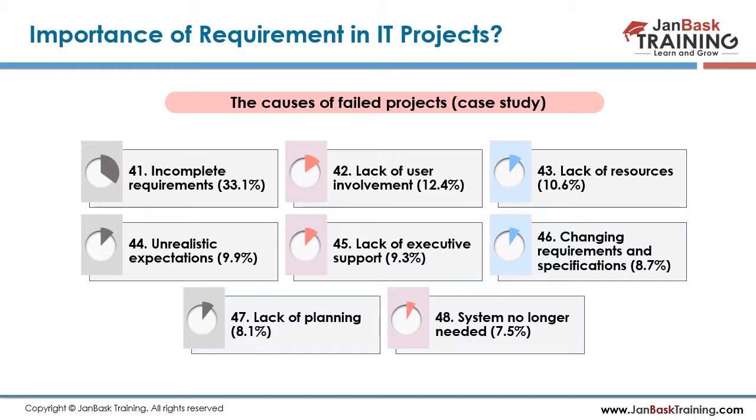You have multiple requirements. There are certain other ways, like you keep on involving clients and getting regular sign-offs from them on a functionality basis. Instead of getting a sign-off on the complete requirement, let's go with a sign-off on a requirement basis. So these days in Agile, the smarter way to avoid these failures is that since we have started working in the Agile culture, we are getting requirements signed off by the client on a user story basis.